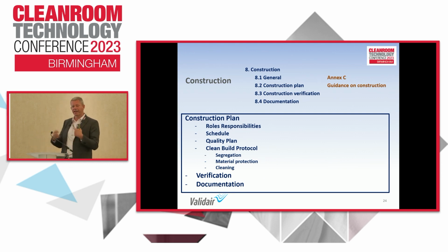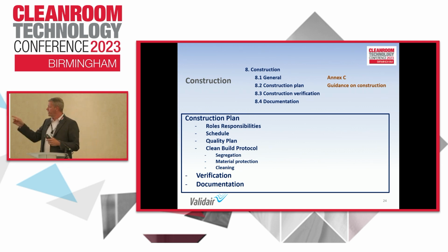You control people going in and out. So you have something in your clean room protocol that goes, once we get to this stage, we're controlling who comes in and out of this clean room. We may have a gowning regime for them even though we're not finished. And that's what will go into your clean build protocol. And it talks about verification.